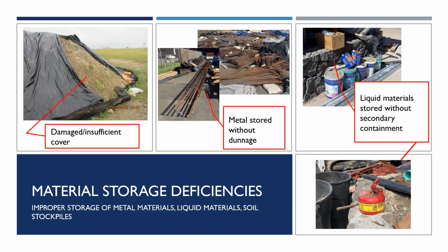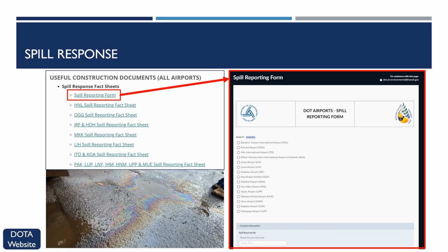and a cover. The SWIP or SSBMP plan developed for the project site will include a section on spill prevention and control. It's important for the project team to be familiar with the proper response practices for their site. All spills identified during AIR EE inspections will need to be cleaned immediately, and documentation of cleanup efforts will need to be provided to the AIR EE inspectors by the end of the day.